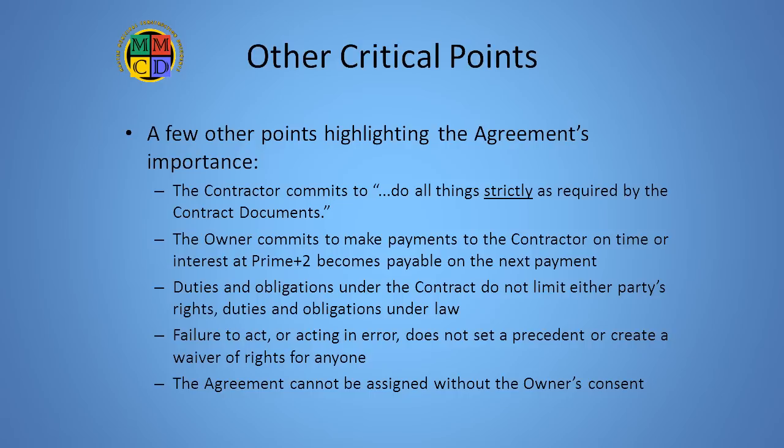Finally, because the award of the contract is expected to be based at least partly on the experience of the contractor, superintendent, and their subcontractors, the agreement precludes the contractor from assigning the contract or any portion of it to someone else without the owner's express written consent.